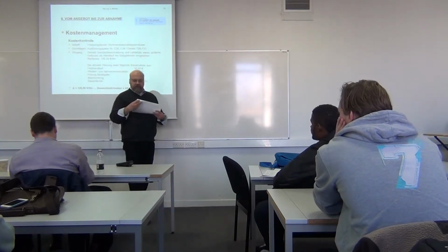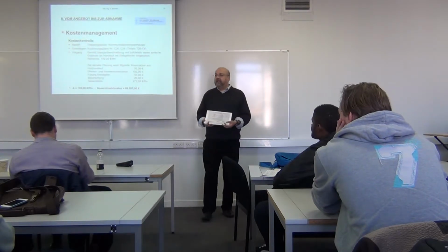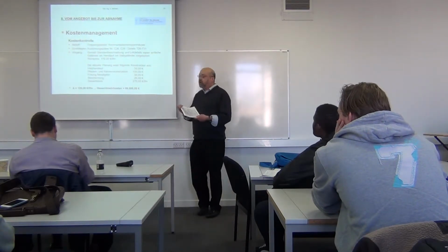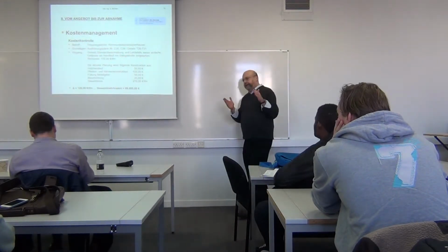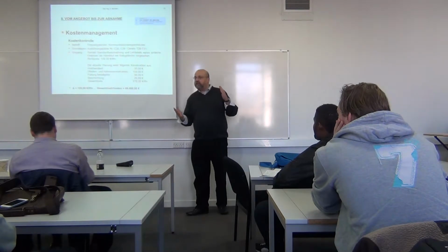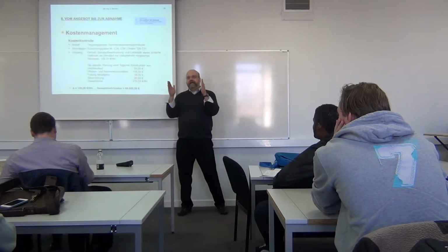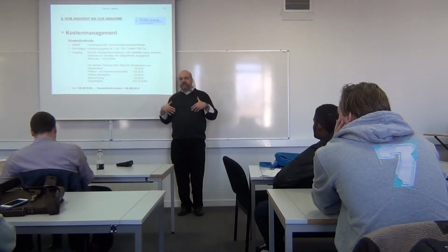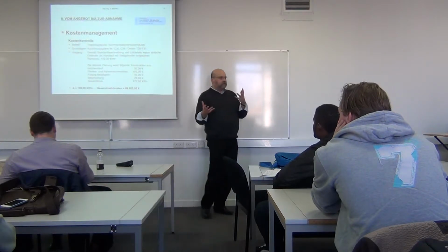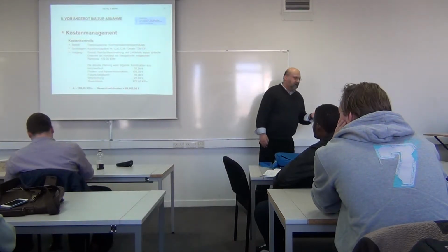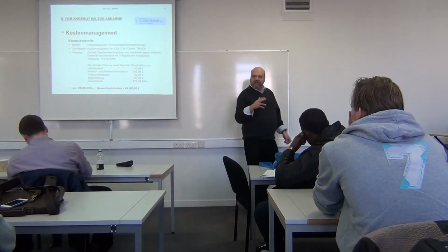Cost control is the next phase. After getting the contract, which follows all this bidding, in cost management there is always, at certain intervals, a comparison between the budgeted costs, which are my limits, and the real costs on site in the project. You know what I mean? We call it soll-ist, which would be like what has to be and what really is.